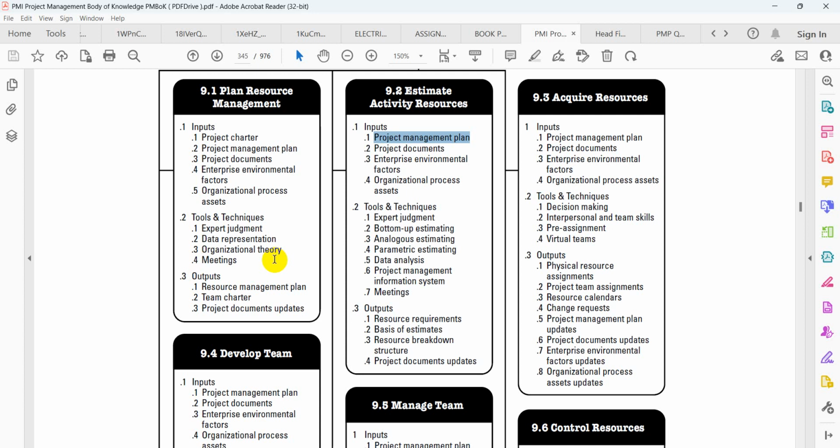But the project management plan, in many processes, it's the input. Why? Because it's the second document created after the project charter. We know that. When you create your project charter, on the 5 process groups, the second one is planning. Under initiating, you do a charter. A charter is a brief spec, just authorizing you to run the project. But on a charter, there is also information of stakeholders, all those things, and estimates. Most of the things that are on a charter are not real figures. Most of them are estimations. But we work with these estimations to do a real project management plan.